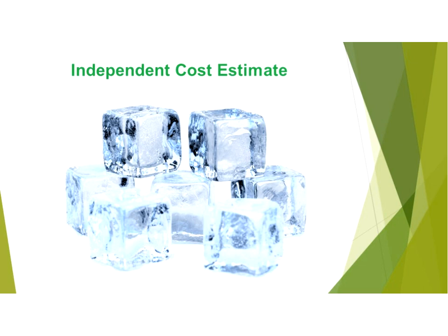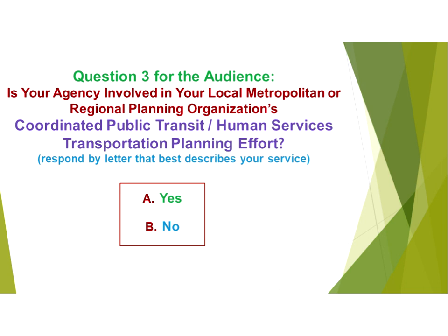At the same time, one should estimate the impacts of the new technology on revenue and productivity. It's not just cost. Will the additional ridership gained by more efficient scheduling provide a positive return on investment? Can the cost of the technology be recovered during the term of the contract, either due to increased revenue or reduced operating costs? So an ICE can be a positive thing.